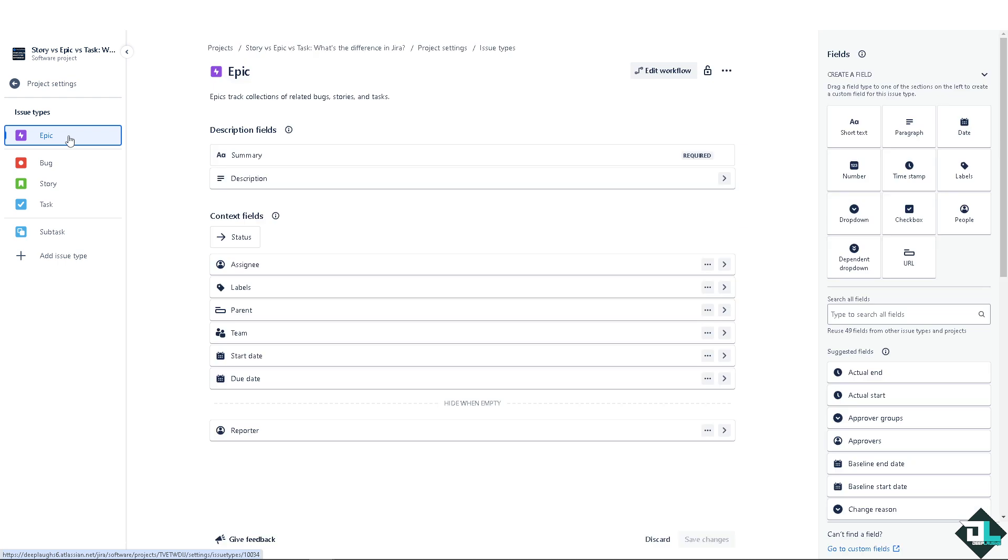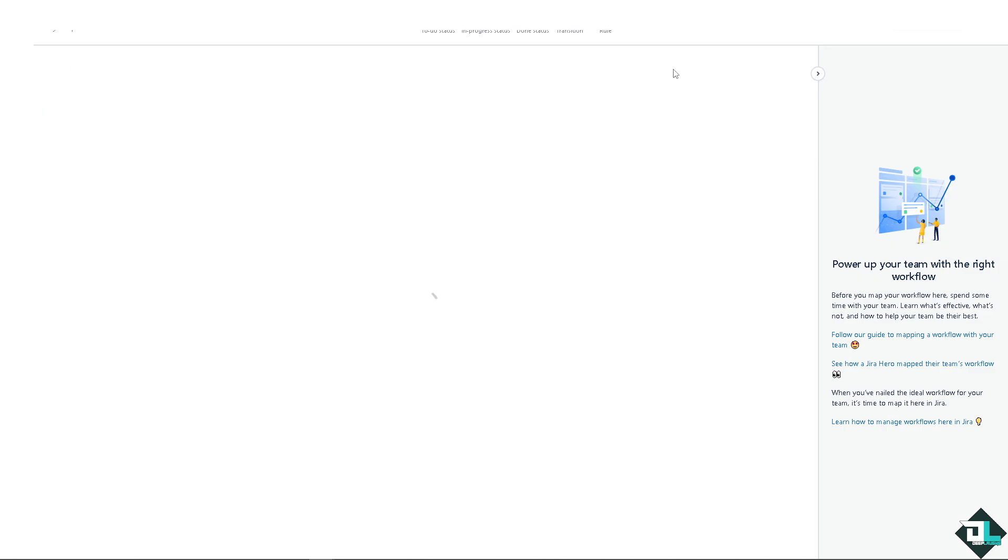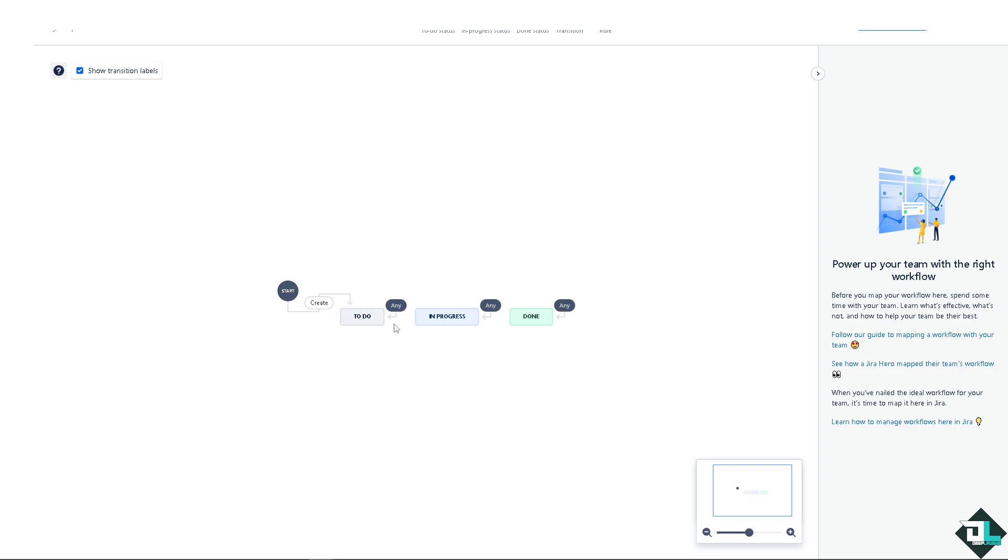You have the task, story, and epic. Let's deal with the epic first. An epic is a large body of work that can be broken down into smaller, more manageable pieces. It represents a big feature or project that cannot be completed in a single sprint or iteration.